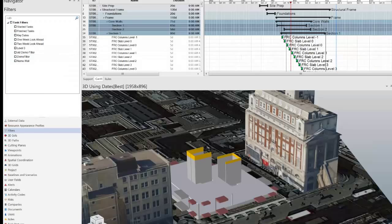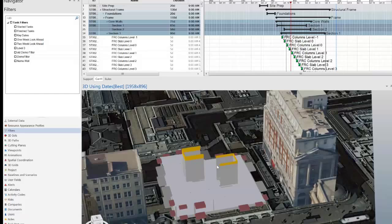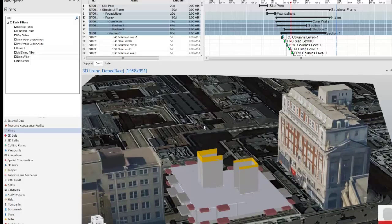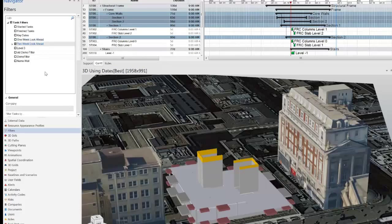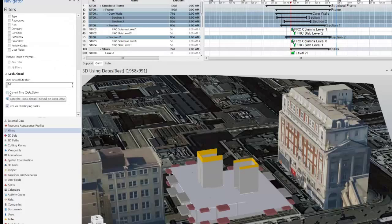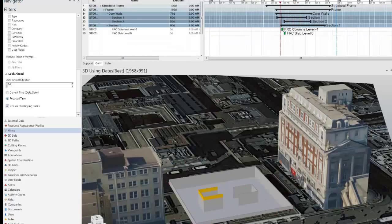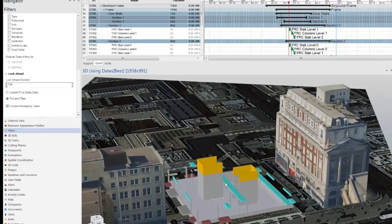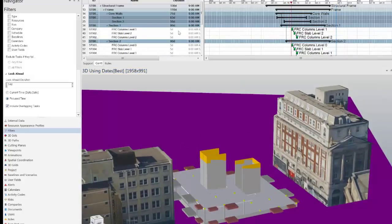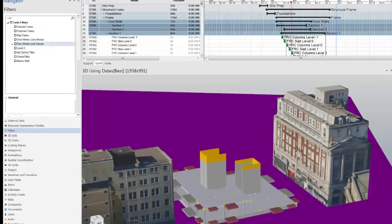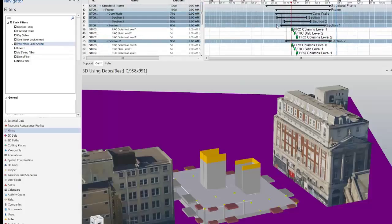Back in Synchro, I've opened a basic residential model. To get the report set up, the first step is to create a two-week look-ahead. For the two-week look-ahead you want to enable the focus time, not the current time. When you set it to focus time, as you scroll through the timeline it filters the timeline based on the tasks that are current for those two weeks. Without the filter lots of tasks are listed, but with the filter you see just the two-week look-ahead.